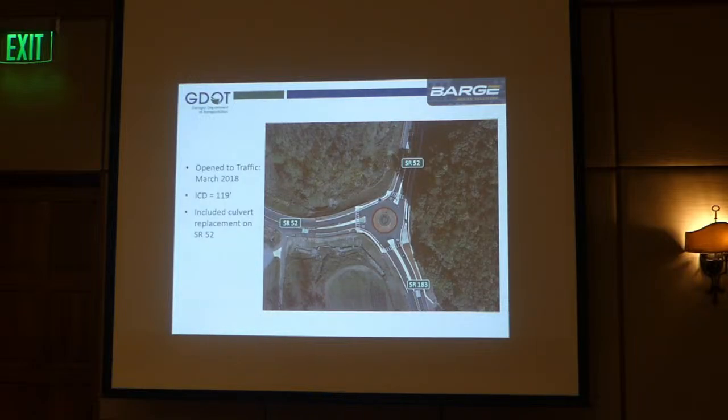Now, this wasn't necessarily an inexpensive project, but you can see there's a big culvert here. They had to extend the culvert to be able to get everything to work out. It wasn't necessarily a low-cost project, but compared to what it would have been had they had to stage it differently and put the intersection off to the side, it was a lot cheaper than the other alternatives.